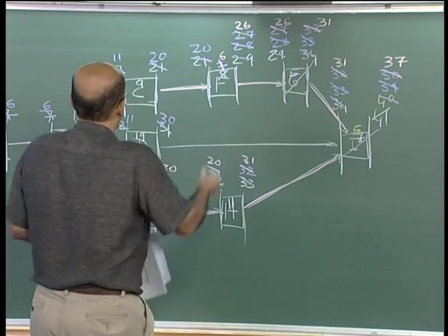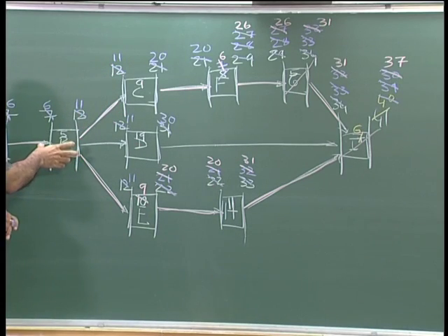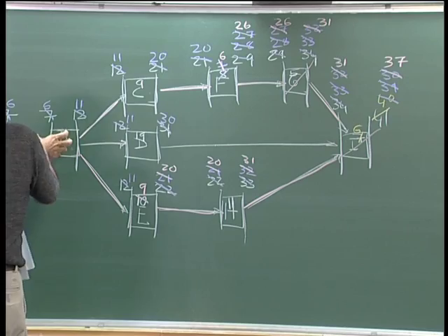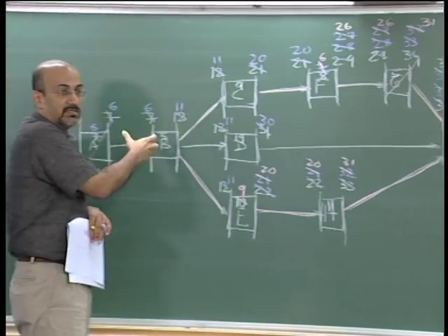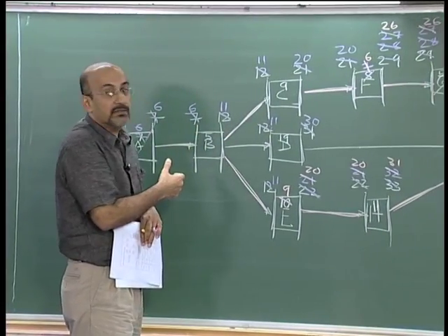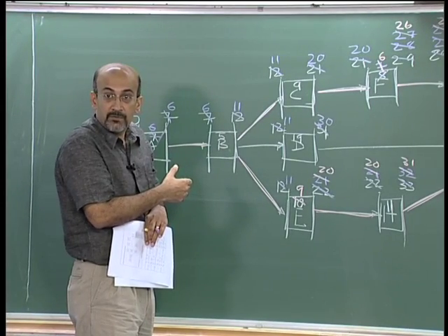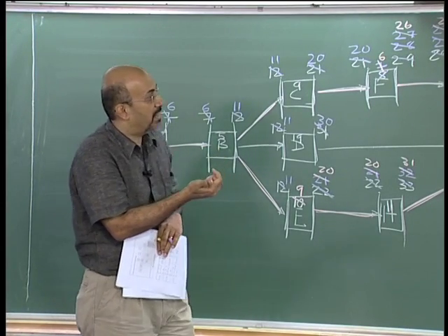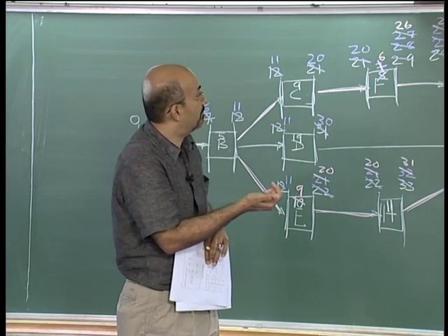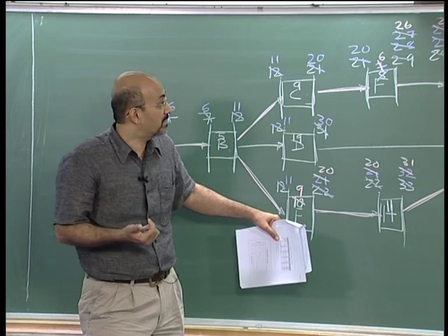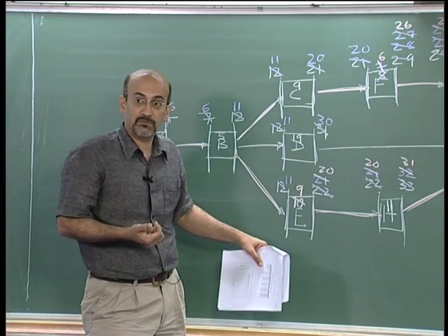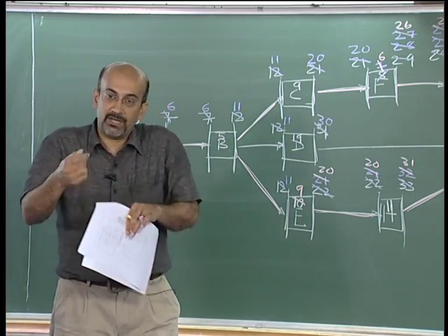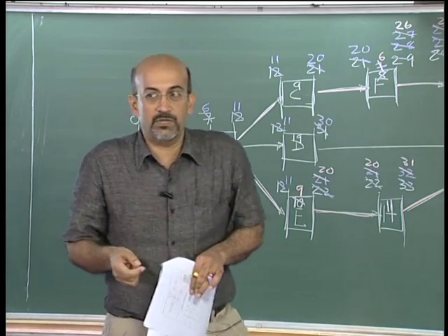Now we have B. Once I take B in, I can take it by how many days? I can take it by 2 days. Again, predecessor to everything, it will come down to 35. And in my step after B I am only left with CE. E is crashed to the maximum, so only CH, C and H. FH is also gone because F is crashed to the maximum, it will come to CH. So we can do this process and you know the principle on which it is based.